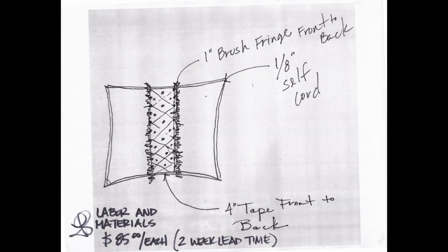Now, I've seen this type of informal estimating done for pillows, for drapery treatments. I've seen it done for even custom pieces of furniture. So don't be surprised if this is the method that workrooms in the local area where you're designing use. It's totally legitimate and actually a very accepted practice. So you can see to create this pillow from the workroom, it's $85 per pillow, and you can see there's a 2-week lead time. Lead time refers to how long after the workroom receives the materials that the designer can expect to get their pillow.